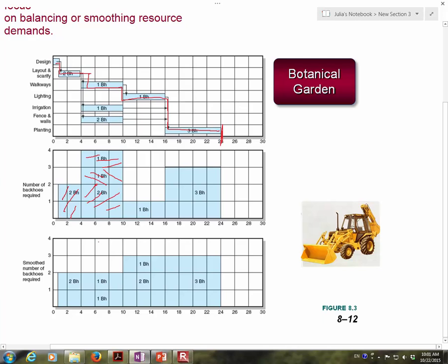All right, so according to the Gantt chart, you can load the resources to the time scale until day 24. That's the end of the project. So if you observe this resource profile, you can tell our resource demand is not even. We have peak time, like this, we have valleys, and we have going back again to another small peak time. Okay, so remember, we do not want resource fluctuation like this.